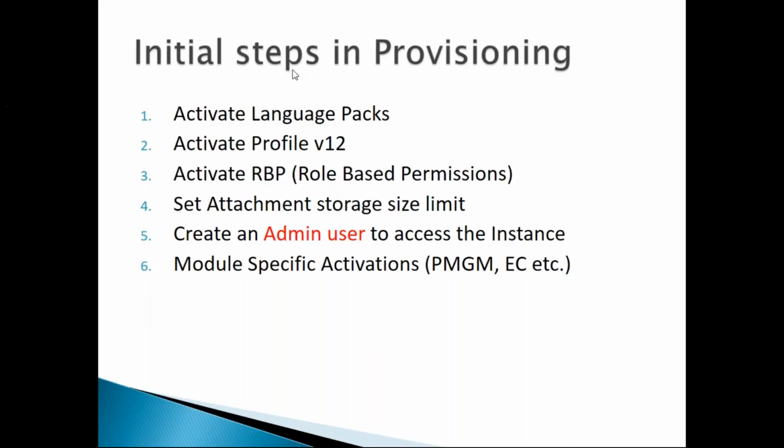The first thing is language packs. Which languages are we going to implement for this customer? You need not wait for the requirement gathering. That would have already been decided in the project scope, in the prepare phase. In the project scope itself, IBM, the implementation partner, and the customer might have already agreed. So out of those 43 languages, we can right away activate the required ones in provisioning.